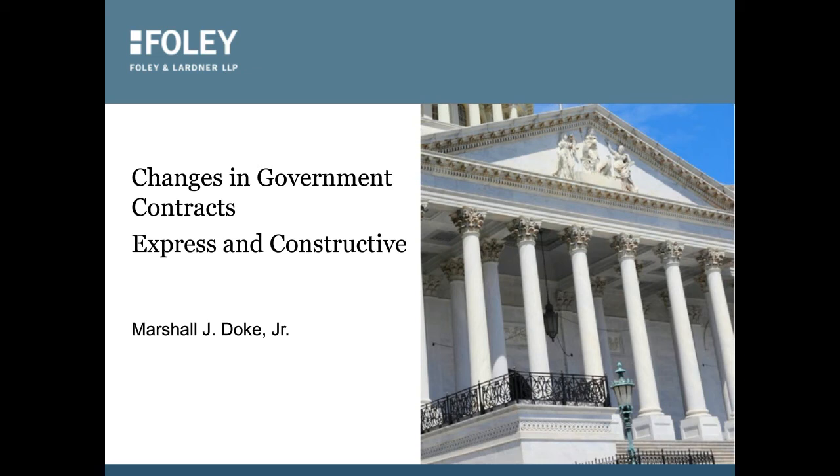Now, one reason people don't appreciate the power of the changes clause is because they don't understand the duty to proceed with the performance of the change. Contractors can't question or negotiate the technical aspects of the change. Contractors cannot insist on a price increase or a schedule extension before beginning to perform. If the contractor and the government disagree on the cost, then that's resolved by the disputes clause of the contract.